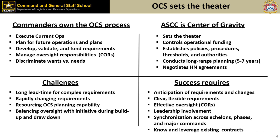Yeah. But knowing and leveraging existing contracts, that's another opportunity to engage the contract support agency or entity in that area. Oftentimes, wherever you're operating, there is a contracting battalion or a CSB or a team providing that operations contract support. There's vehicles in place. It's just a matter of modifying or tapping into another vehicle that's pre-existing. It's also good stewardship, because if you have two contracts, you get two overheads, etc. With one, you've got economies of scale and less overhead, so it's just cheaper as well.